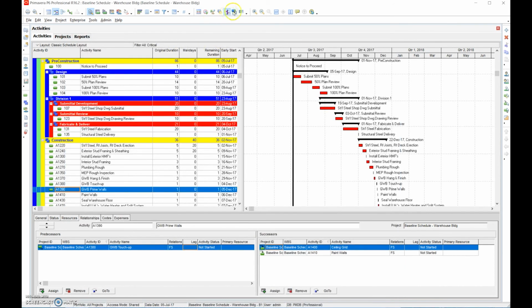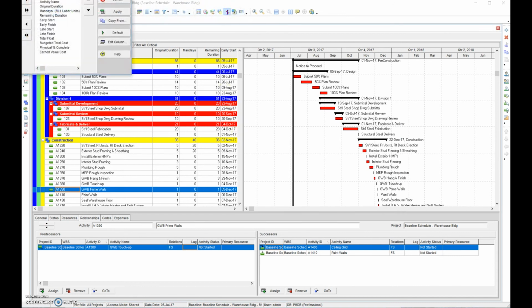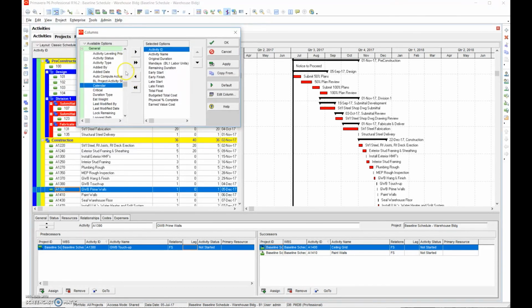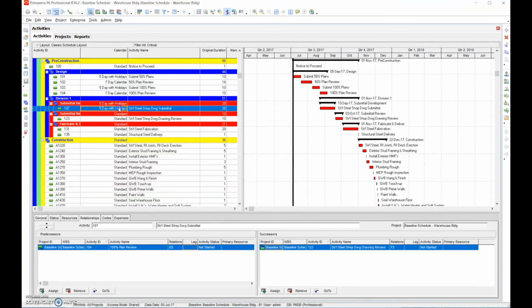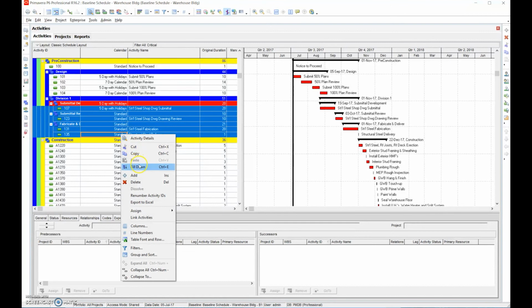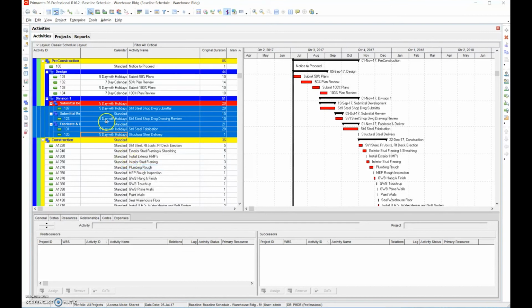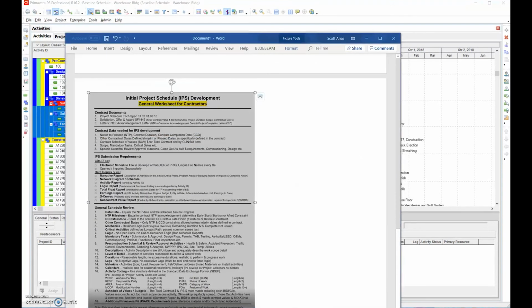So we could go through and add a column here, and the column could be a task calendar. Let's see, maybe under general, and then calendars, and we can put the calendar in here, and then look through all the calendars and make sure we have the right calendars involved. Remember, if we want to put more than one calendar, we can hold the shift key down and then fill down, right? So that's helpful. So are the correct calendars assigned?